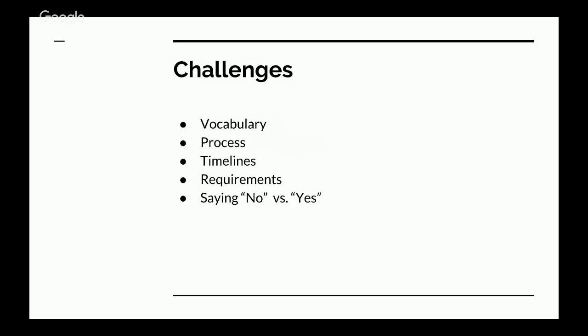And then as part of the post-launch retrospective, we found out that this was just part of their process, and they hadn't been aware of what our process was. Ironing that out was probably something we should have done better, and was definitely a significant challenge. It was the primary reason why, in order to meet the tight timeline, this project went over budget.